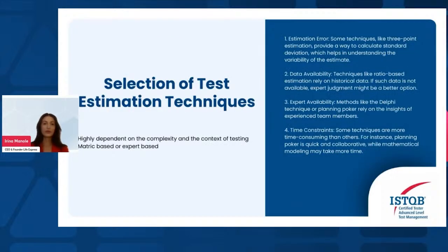We will go further and talk about how we select the test estimation technique. Since the estimated values are important to test management because they will impact the project, these values will be delivered to project management along with explanations that will support a dialogue that most often results in changing input parameters like test scope, based on which the estimates will be adjusted.